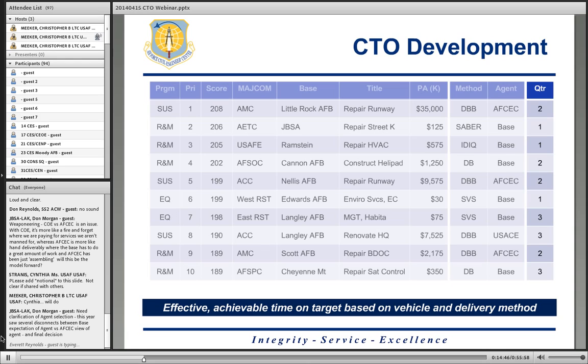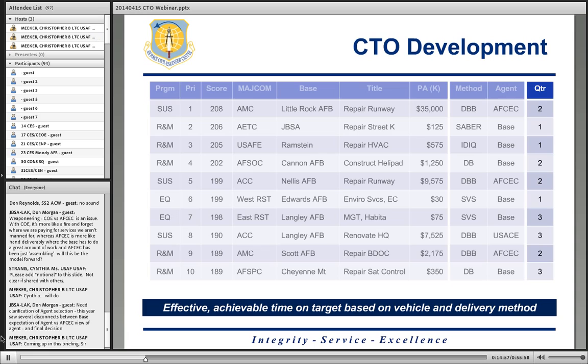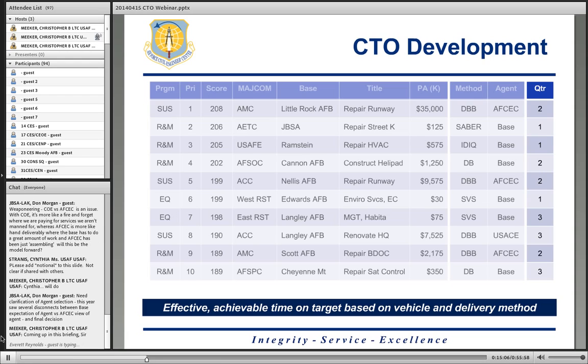But on the back end, I also wanted to know kind of expectations. Were there dates when I know Kidden needed to award a contract or the funds went away? Was there something out there where we had to execute a requirement and be done by a certain time so that someone could move in? Those are key dates and milestones out there that are used to resource our program accordingly.